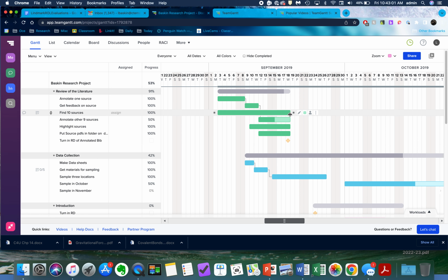We have goals here, or tasks as the software calls them, which are these bars that span a certain period of time. So when you make your SMART goal time dependent, that's how you pick the dates that go in here. There's also milestones, which are single moments in time. You've already had those, like when you have a meeting. A meeting is a moment, not so much a task. So that's broken out and they're listed as diamonds. So this is what a sample Gantt chart could look like.